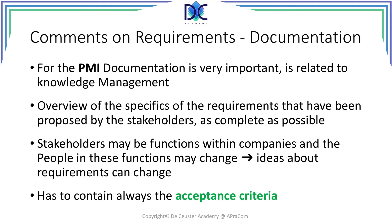Let's look at requirements documentation. For PMI, documentation is very important. It is saved in the historical information, kept with the project, and it will help the project manager and team to defend the solution they completed. Stakeholders may also change, so it's very important to understand what requirements came from whom. When people change in a function, the requirement may have been stated by a function, but when the person in charge changes, the ideas may be different. So it's very important to have written proof that a specific stakeholder or function wanted a specific requirement, in case there is a discussion later during the closing of the project.